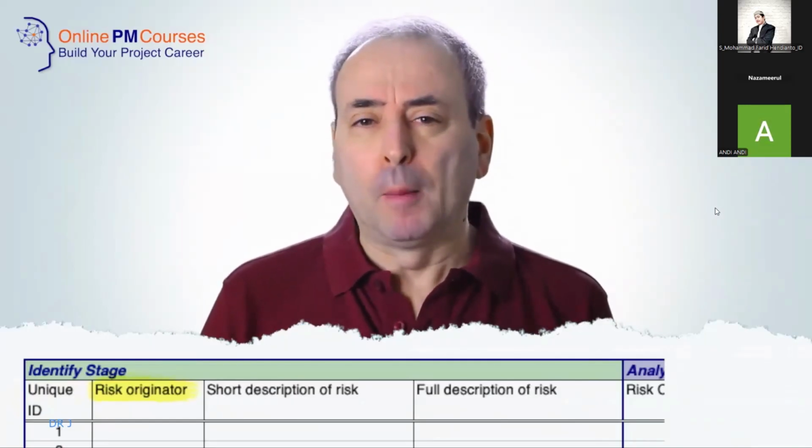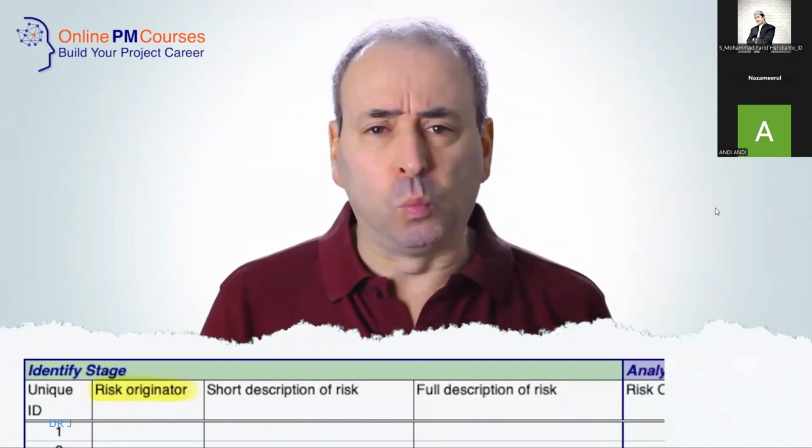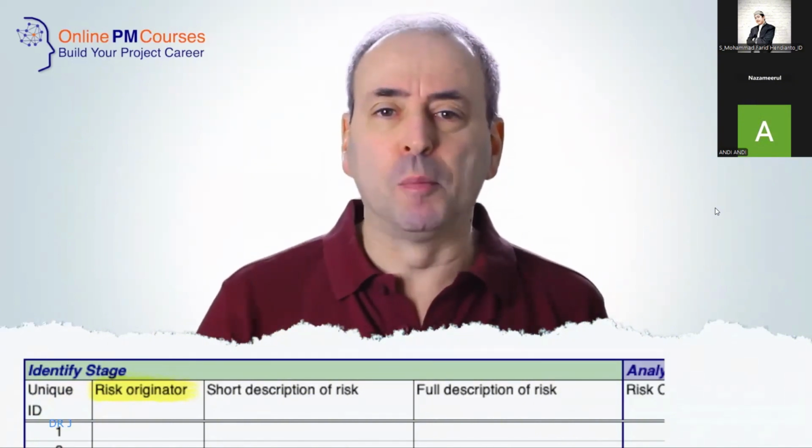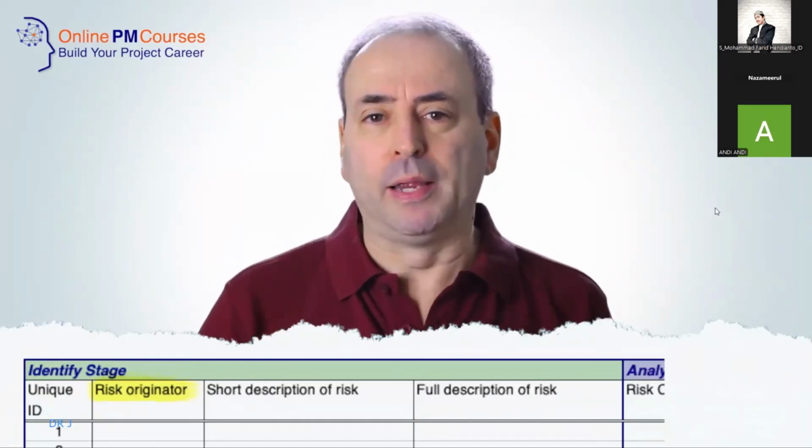The next thing you may want to consider is the originator of the risk, the person who first identified the risk. Why would you record that? Well, because if in recording the risk, you use some shorthand that you understand at the time, and then later you're not exactly sure what the nature of that risk is, you know who to go back and ask to get clarification. By the way, the originator of the risk is not necessarily the person who is responsible for managing it. It's simply the person who recognises that risk at the first time and causes it to be on the risk register.